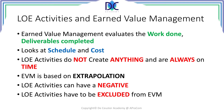When level of effort activities are higher than originally estimated, we will have the wrong impression that the project is not performing well. We want to know exactly what is happening with the project, so when you do earned value management, you have to exclude those level of effort activities. It is important that you understand the difference between tangibles, intangibles, and level of effort. See you in the next session.